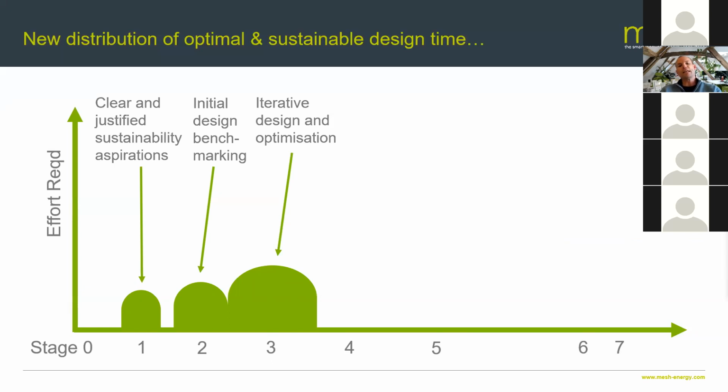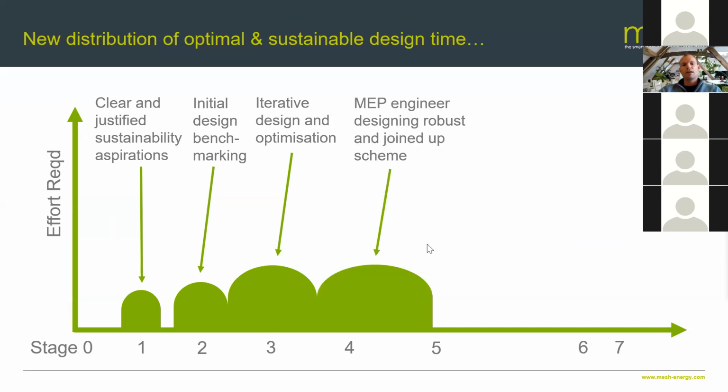And then when you go in for planning, you're far more confident with the design that you're putting forward to the planners. You can tell a better story to the planning department, particularly around sustainability, if you've done early stage SAP calculations and energy calculations. There's a richer story to tell the planners, and less surprises also, should you be given the go-ahead. And actually, there's less work during the technical design phase to do. You've pushed some of that effort earlier on in the design process.